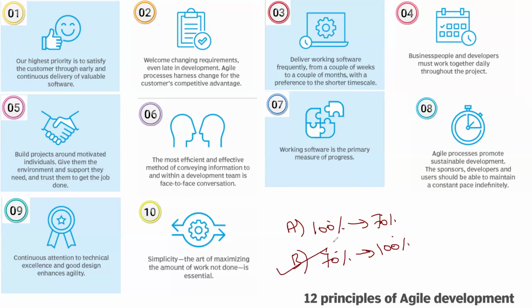If you are tracking the performance or progress in Agile, at the end of that period, option A is 0% complete because you took everything and you finished only 70% of it. So it's either 0% or 100%. But if you are doing B, you are 70% done. So take what you can complete and only do that. No multitasking in Agile. I won't do 5% here, 10% here, 20% here. No, take something, complete it, then move on to the next product.